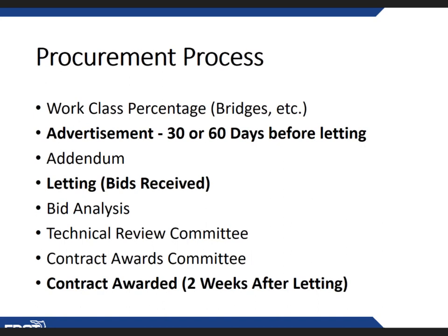If we identify pay items that are unbalanced, we may ask the project manager to identify the quantities to make sure that they're accurate. And our goal is the accuracy of the information and obtaining the lowest possible cost for the department.